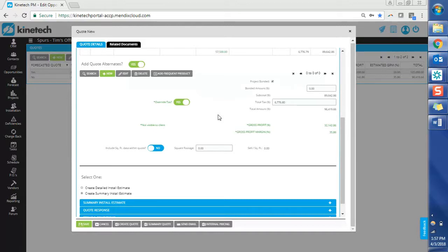So one thing that came up in talking with partners is that, doing DIRTT stuff, it's all measured in linear feet, but a lot of times that's apples and oranges for when you're bidding against another company. So we included an area in here to include your square footage so that they can get that sell by square foot as well. So let's just say this is, call it something like 5,000 square feet.